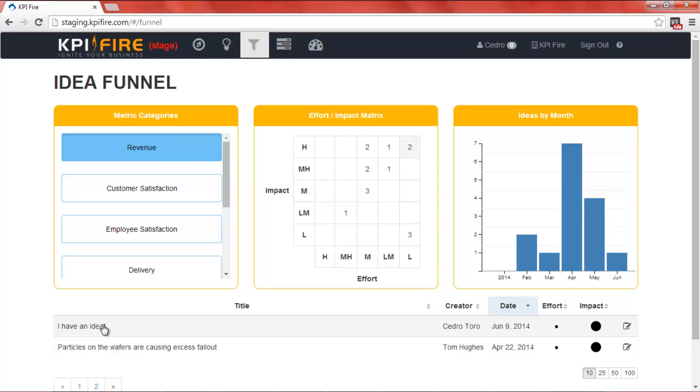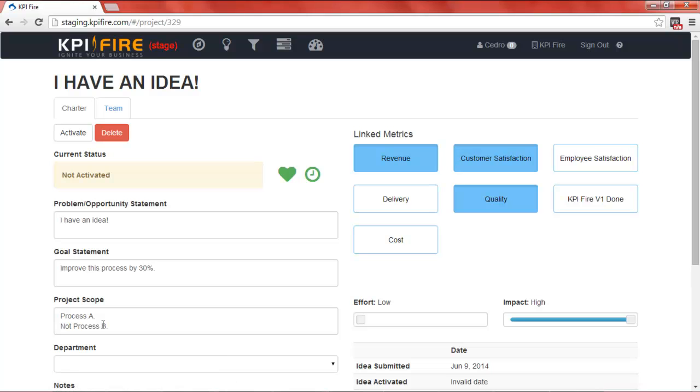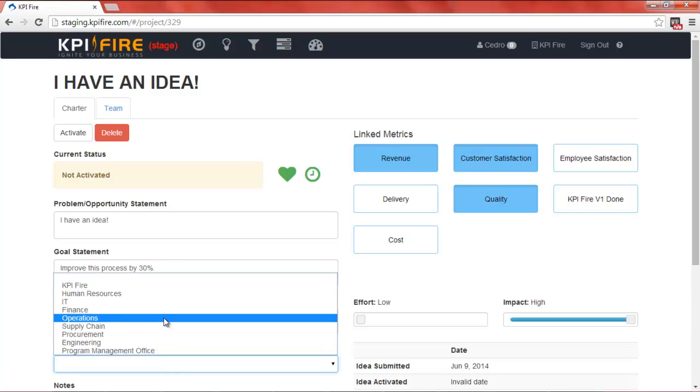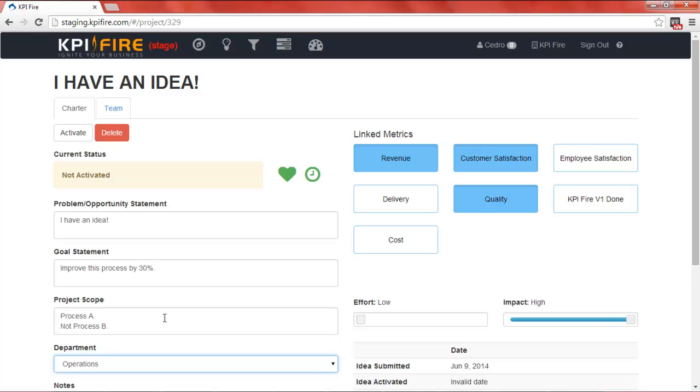To activate the project, I simply click on the idea, which takes me to a project charter page. On the project charter page, I can fill out important details about the project, such as the problem or opportunity statement, the goal statement, what's in and out of scope, which department the project will fall under, and so forth.